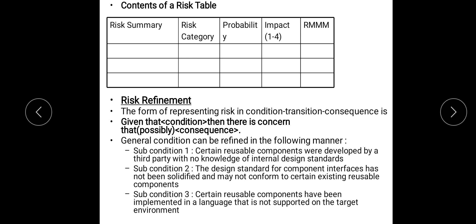We discussed the contents of a risk table, which has columns for summary, risk category, probability, and impact on a scale of 1 to 4. Then RMM — Risk Mitigation, Monitoring and Management. Next is Risk Refinement. Risk Refinement gives a structured form for representing a risk,